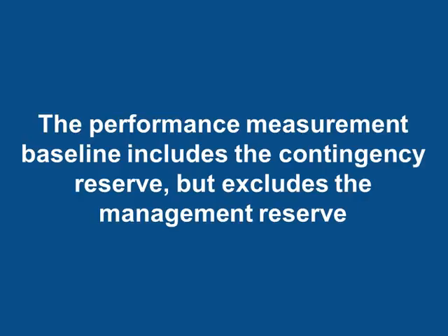Here's an important little detail for you to remember as you are preparing for the PMP exam. The performance measurement baseline includes the contingency reserve, but it excludes the management reserve. You may want to commit this one here to memory because it is sometimes used as the answer to PMP exam sample questions, in books or in simulators online.